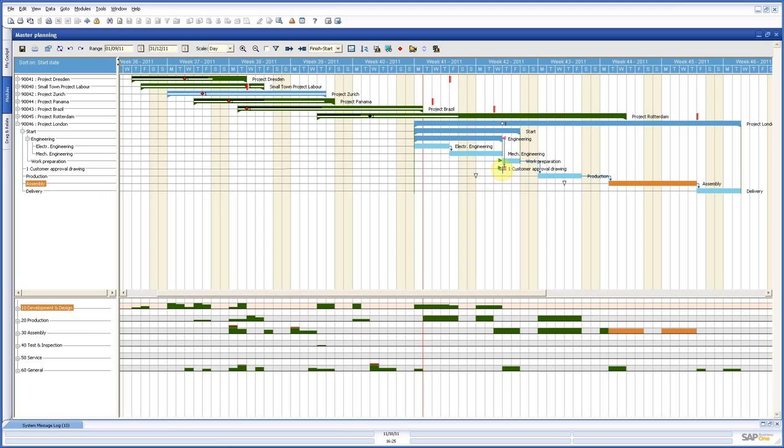And the last thing important for this planning project is this icon, the green and red symbol, which represents a milestone, and you can also see that milestone on the project bar above. Milestones are very important. They can mean very important steps in your project, and in this project bar you can have a couple of milestones, and one of the things you can do is link invoices to this milestone. So if this milestone is finished, you can send your first invoice, for instance. So that's a very powerful tool as well.